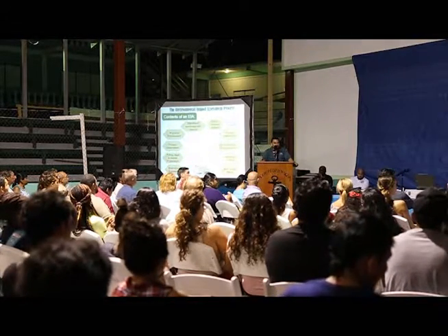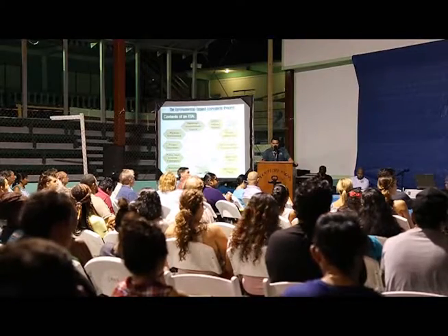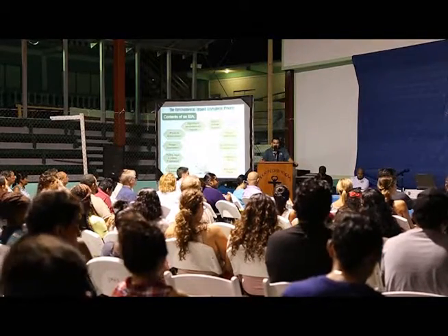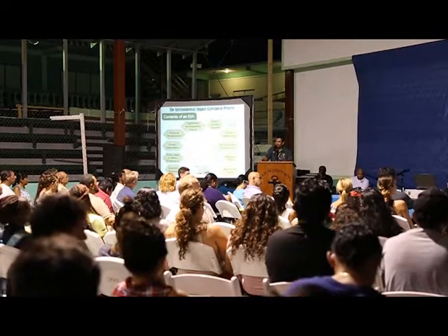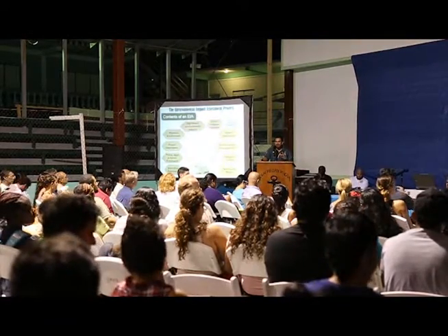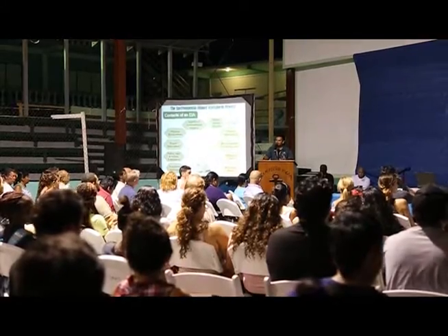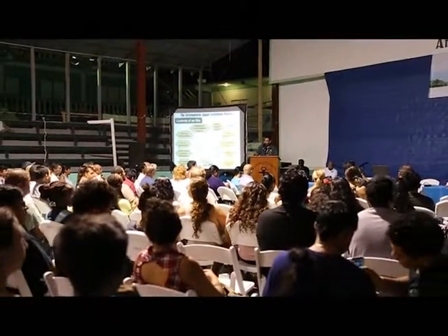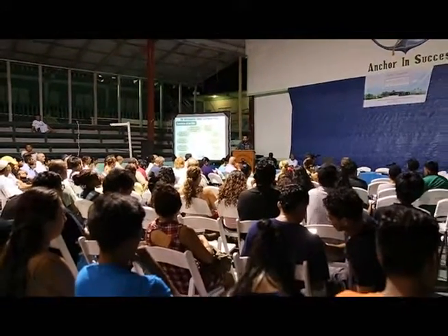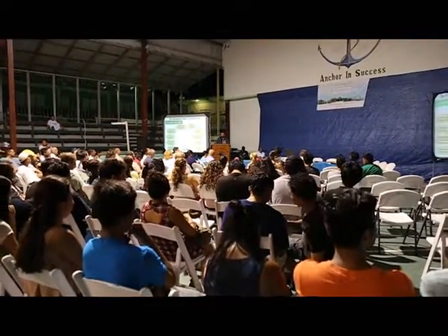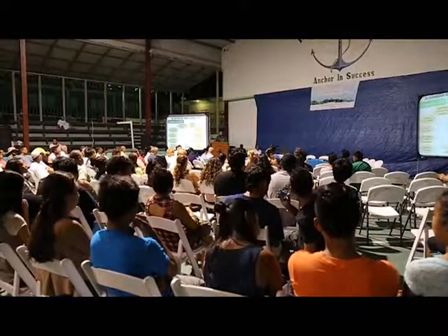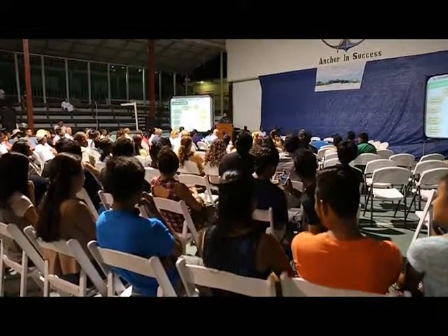The information that is gathered in the mitigation plans, these are the measures that are used in the development of the environmental compliance plan. The environmental compliance plan is a legally binding set of terms and conditions that the developer is required to comply with. Okay?